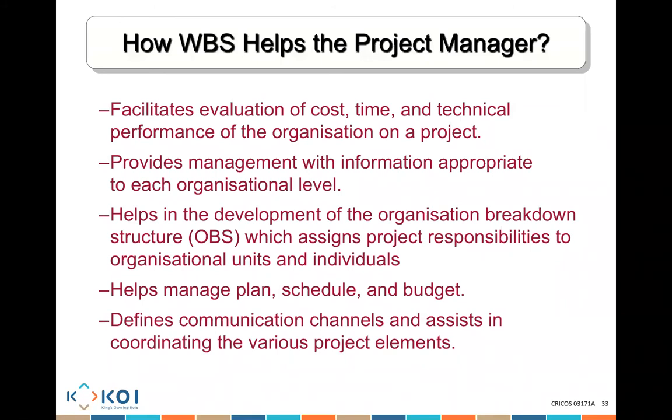Because I know you get paid, let's say, $800 a day, I know that job has cost me $800 for a day. If I said the job will take 1 day and you finish the job in 1 day, I know I finished within the time. So I can monitor my time. I can monitor my costs. I can monitor whether I delivered the technical expectations and requirements. That's really what we try to do.